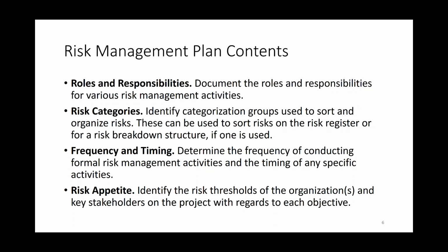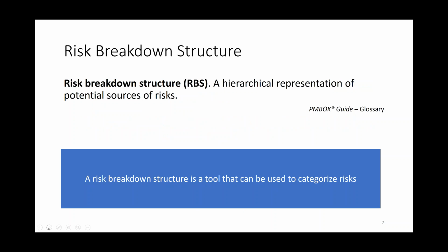But it did say, hey, the farm school is important, getting the pea patches is important, but if the dog park doesn't open up on time, there's a greater risk appetite for uncertainty associated with things like the dog park, which don't bring in revenue, versus a short growing season where you need that farm school, you need those pea patches available, because if they start too late, then you've lost the whole season. So there's less of a risk appetite for that kind of schedule conflict. Okay, next slide.